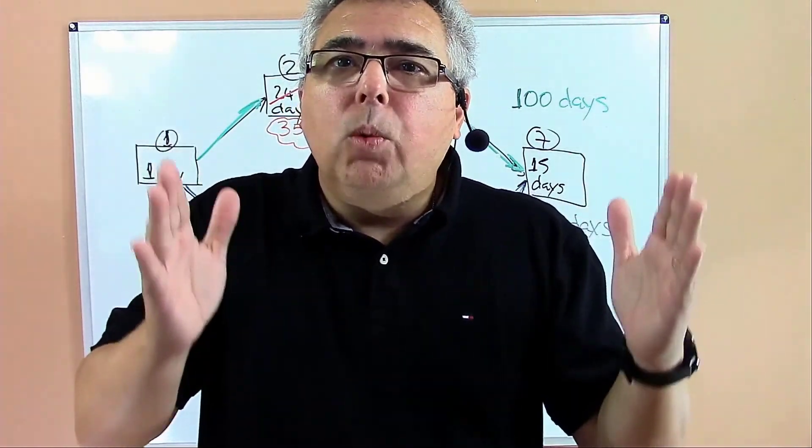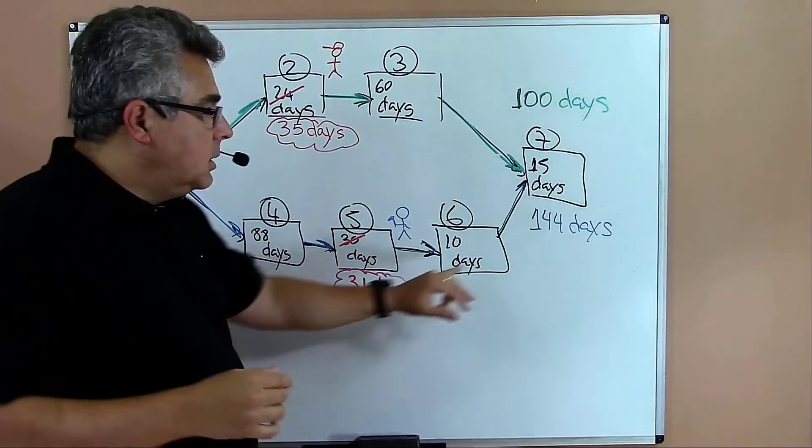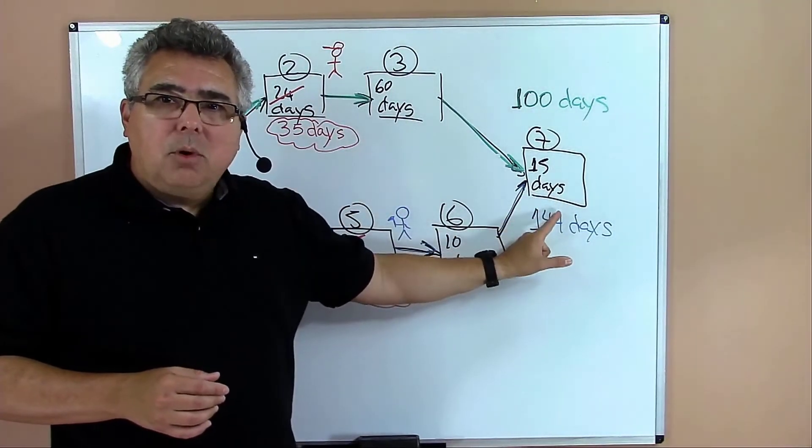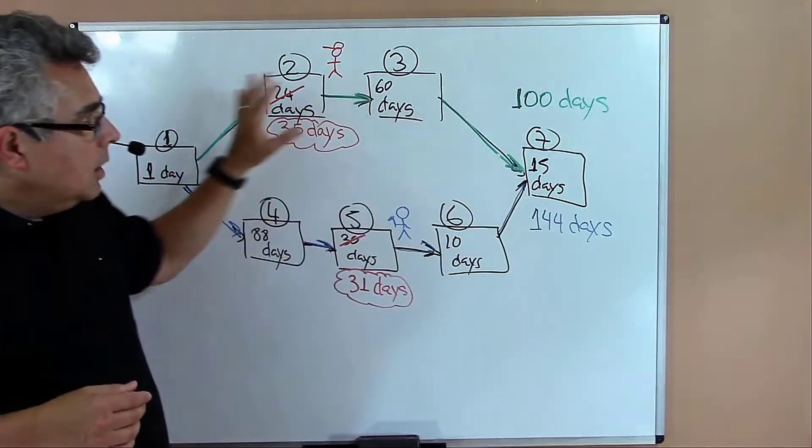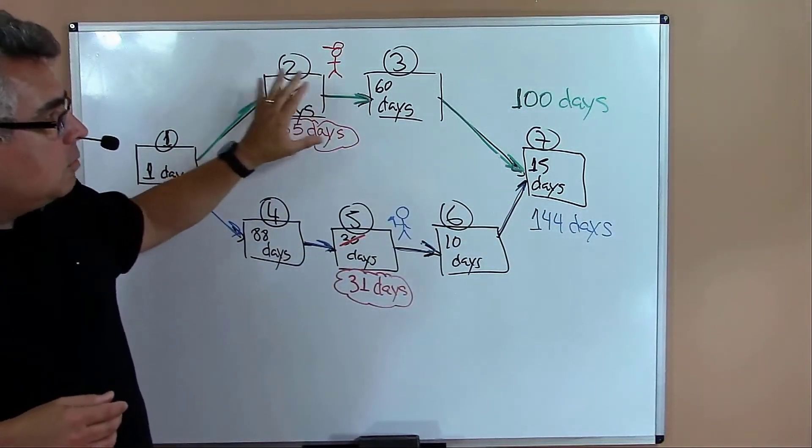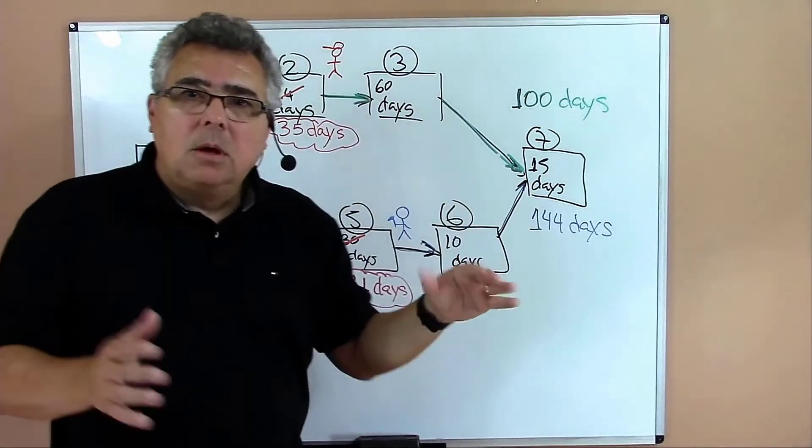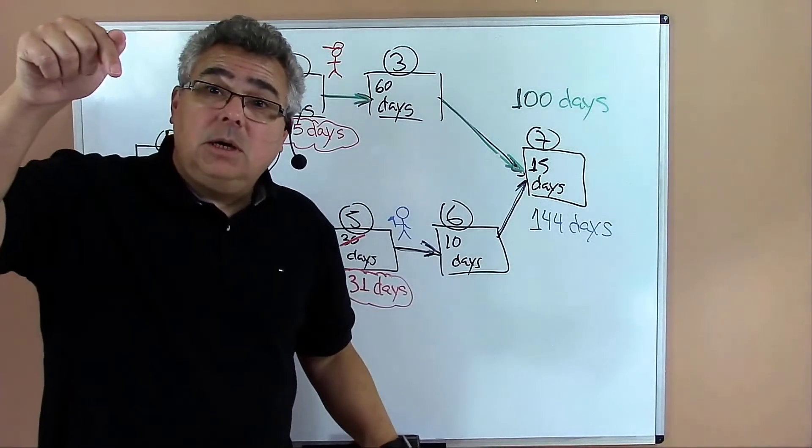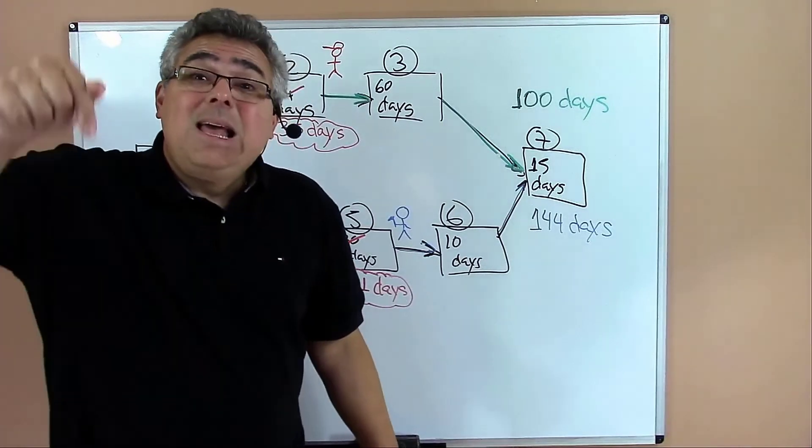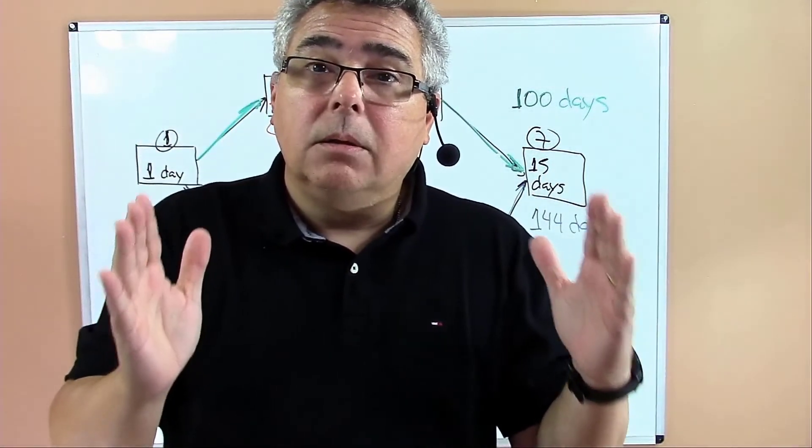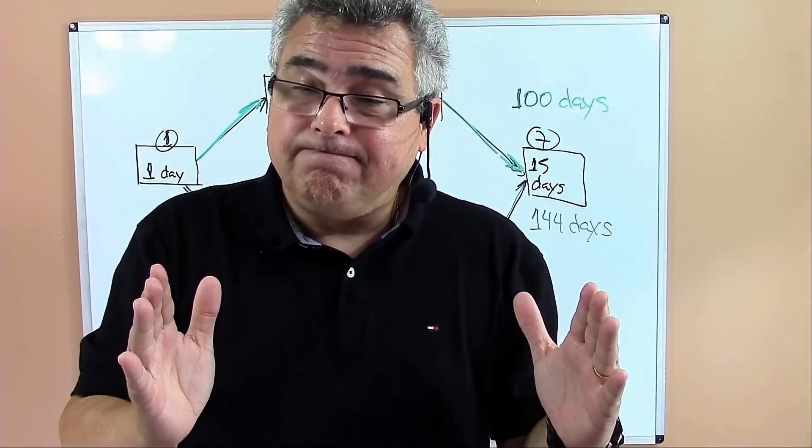And that's why we call that a critical path. It's the longest, and because it's the longest, it determines the project duration. Sometimes you still have room here to start late or to take more time, but in the critical path you have to start on the date and execute within the duration that was established in the plan.